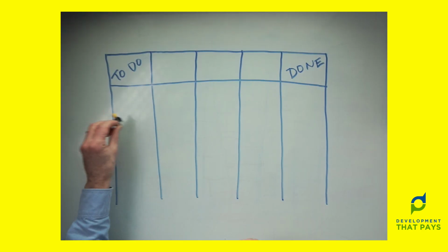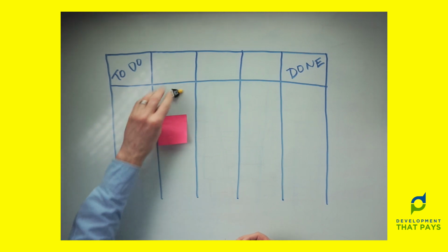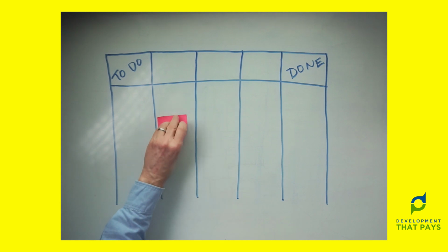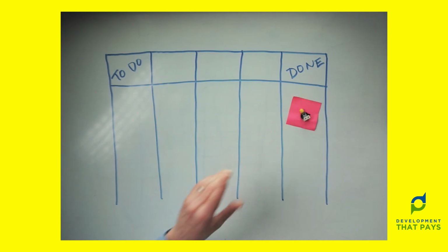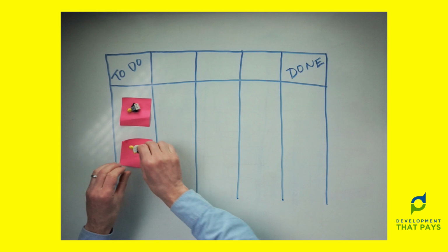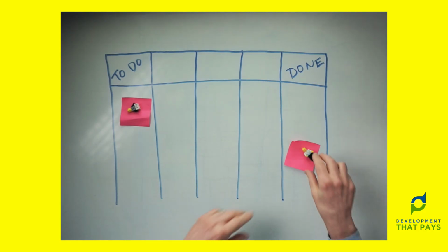The way to determine that is to figure out if and how often work changes hands. So if work goes from to do and is picked up by this guy, and this guy takes it all the way to done, then 1 column is enough. If that's how all of the team operate, everyone picks up their own ticket and sticks with it all the way to the end, 1 column is enough. The board that we were just looking at before, the doing column in the middle, perfect.